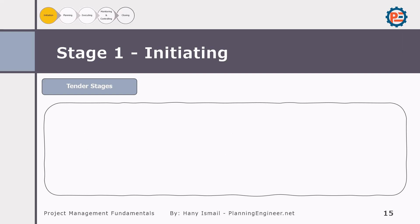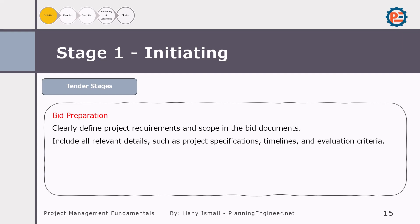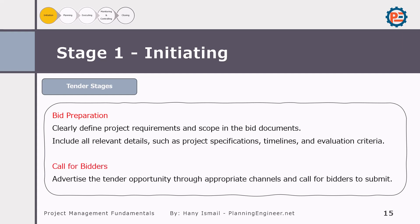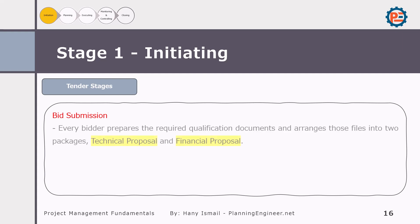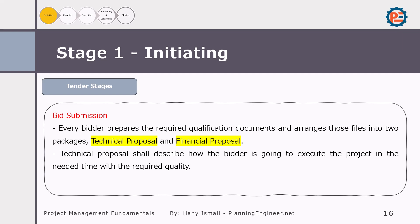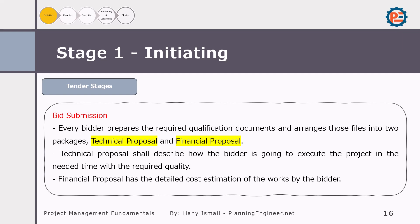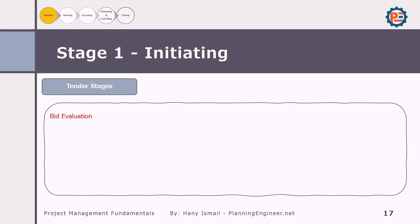During bid preparation, it is important to clearly define the project requirements and scope, including all relevant details such as specifications, timelines, and evaluation criteria. Once bid documents are prepared, the next step is to call for bidders — advertising the tender opportunity through appropriate channels. Each bidder prepares their required qualification documents arranged into two packages: a technical proposal and a financial proposal.